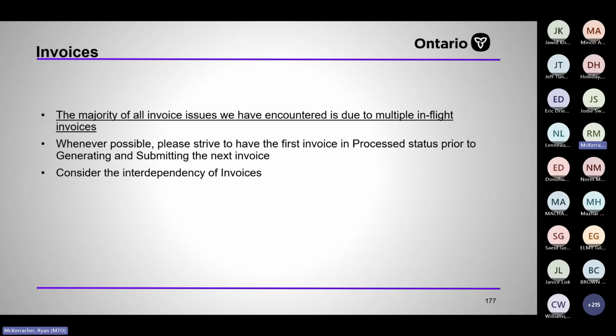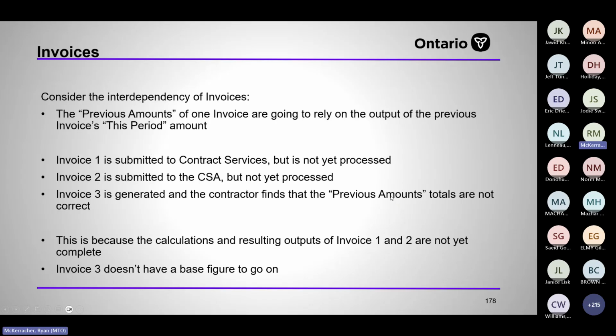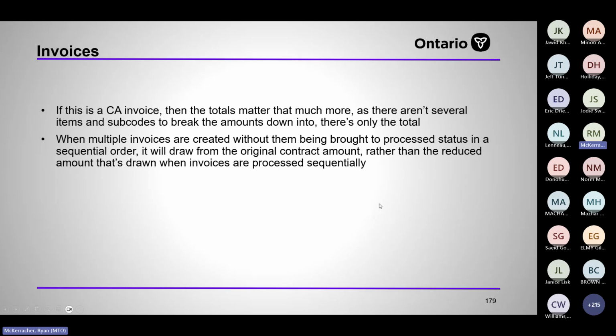So it's very important to do the reconciliation. When they're manually entering into the invoice, they're circumventing that notice of non-payment process, but also, when they input manually into the invoice, it doesn't draw down quantities on the SOV. So the invoice gets processed, nothing gets updated, then they do it again, nothing gets updated, and then by the third one they go, hey, why are my previous paid and to date columns not adding up properly? And it's because they're manually entering, and there's no way for us to really fix it at that point. So I talked about this.